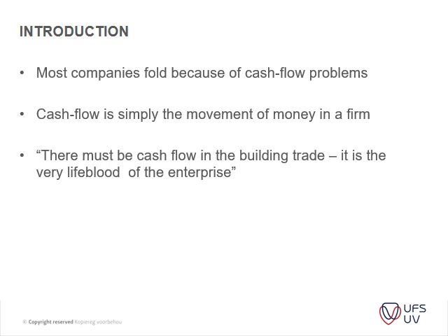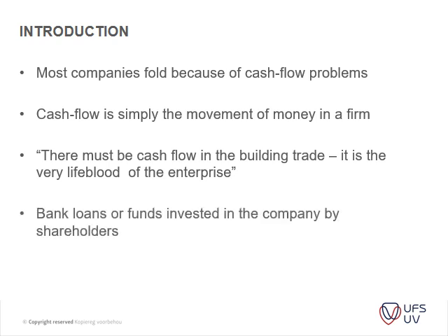So you have to carry the project for a while. So it's important for you guys to grasp the idea that I need to take out a loan or have credit to carry the project while I'm waiting for my income. Okay, bank loans or funds invested in a company by the shareholders. The client can also run into financial difficulty, and that's something that one should also consider.